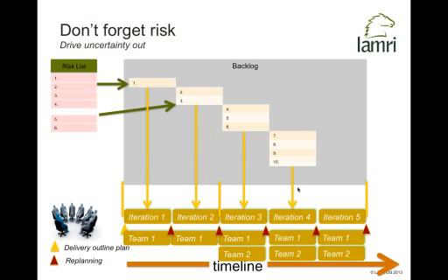Thinking about risk can be really useful. Again, we can exploit the power of iterative and incremental delivery here to drive out technical risk early, to de-risk our project. How do we do that? We can think in terms of our potential solution stack, think of the solution space, think about what we're being asked to do, identify a number of technical risks, and then we can simply map those to particular user stories. And we've got user stories allocated over a number of iterations or sprints. And then as we deliver those stories, we're mitigating that technical risk.